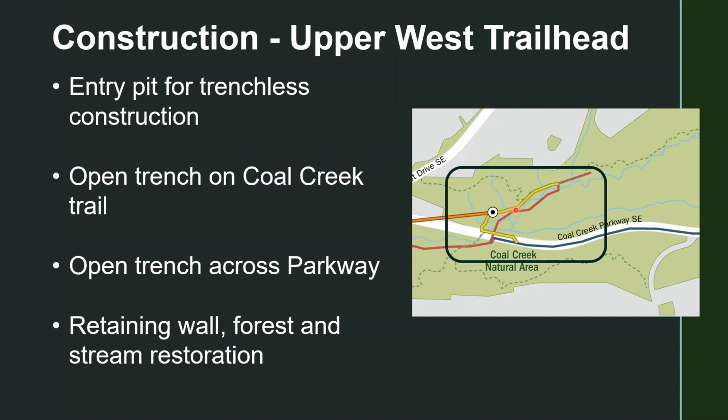Right upstream of that, where this yellow line is, we'll be building up the existing trail, because the existing pipeline goes on the other side of the creek here, and we'll be replacing that with a larger pipe on this side of the trail. That's a very tight construction area, so we will be building a short retaining wall right up near the end of that, right around in here. That'll help us widen the area out so that we can get up there.